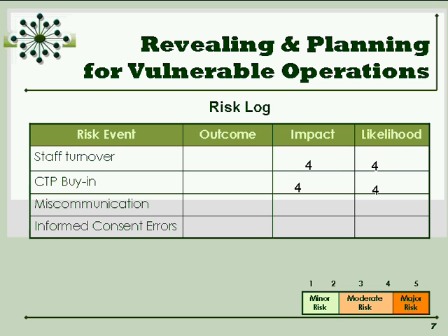Specifically, we have some inclusionary lab tests which are essential to randomizing our participants, their inclusion-exclusion criteria. We had a circumstance with the central lab where they had mechanical failure, and both their machines that ran a certain test were down at the same time. We knew that the lab had contingency plans, but we hadn't had the conversation about what those contingency plans were.